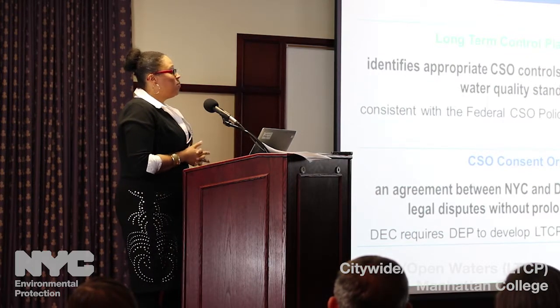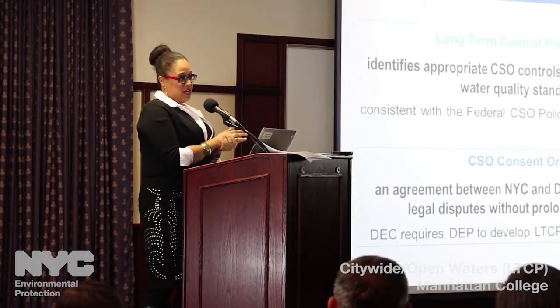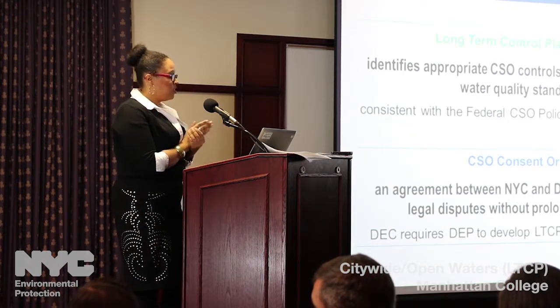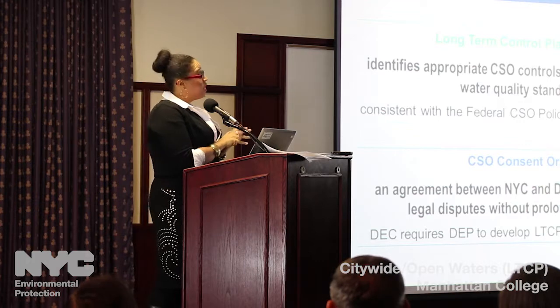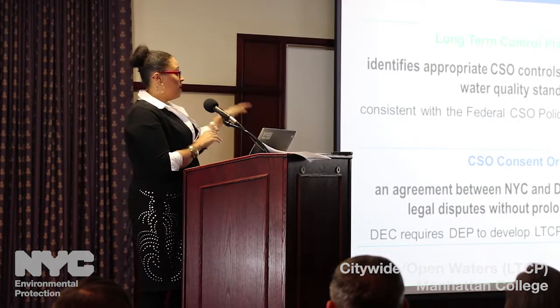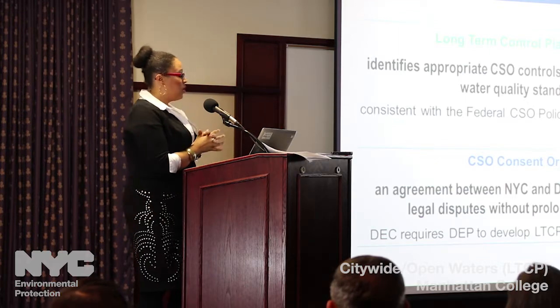So how do we address this? How do we think critically about water quality improvements in New York City, and about CSOs and their impact on water quality? We have what's called a CSO consent order and agreement with the New York State Department of Environmental Conservation, which requires the city to develop what's called a long-term control plan, or LTCP.